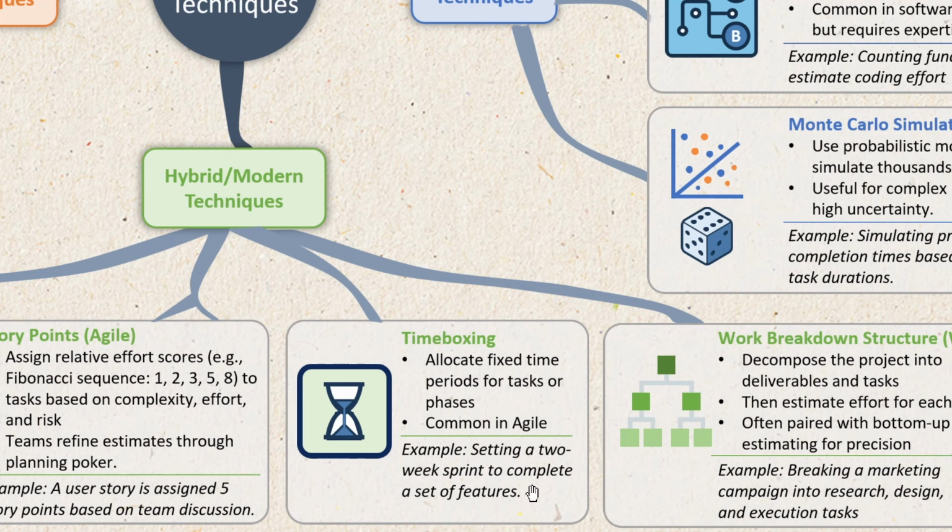If you dive deeper into it, how do you decide which tasks to complete in those 2 weeks, and how do you know that those tasks can be completed in 2 weeks, is all part of Agile methodology, which is a little beyond the scope of this video. For simplicity, assume that you only pick tasks and features that you know can be completed in 2 weeks based on your past experience, and you put all your attention and efforts into completing those in that time frame. Timeboxing prevents perfectionism, encourages focus, improves planning accuracy, boosts productivity, and supports iteration. So timeboxing helps you get more done with less burnout and better clarity.